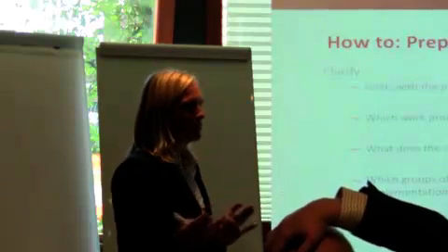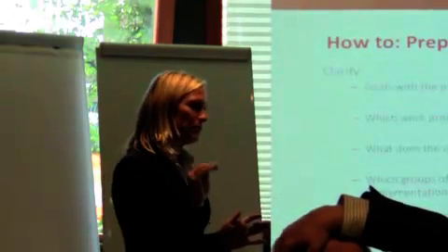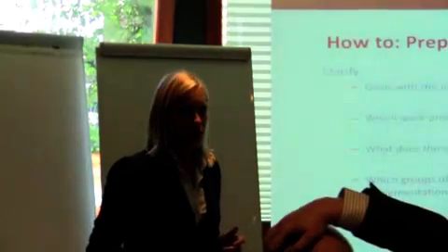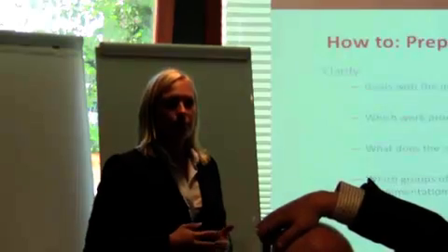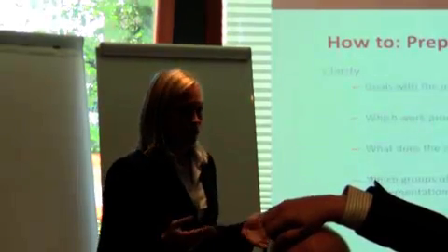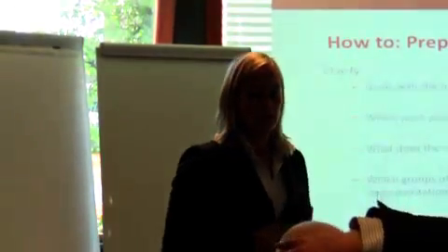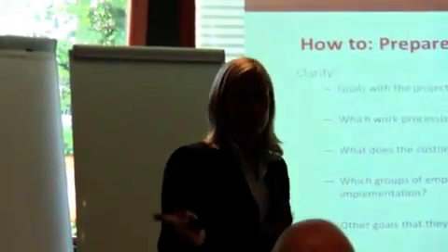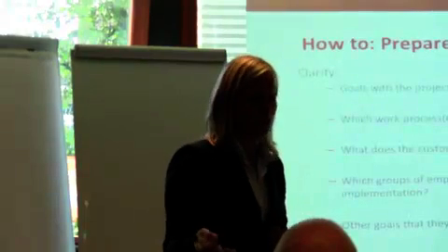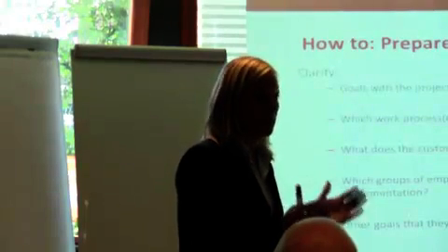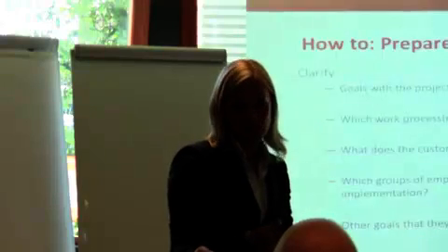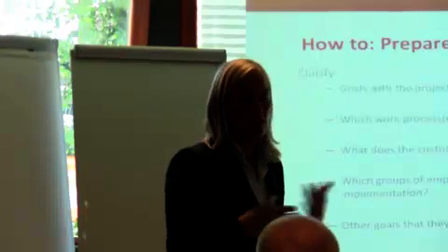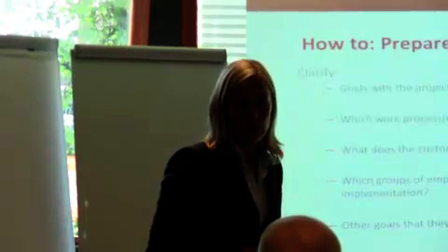And it's very important when you're in the planning phase, and we haven't discussed that here today, but we have something called the PDD, a project definition document, where you plan the project and actually state the goal for the project. You often hear the customer say, well, we want to increase our sales by 20%. Well, that might happen with SuperOffice as supporting software, but it cannot be the goal for the project to improve your sales by 20%. So it's very important to discuss this, so they don't have expectations that we cannot deliver upon.